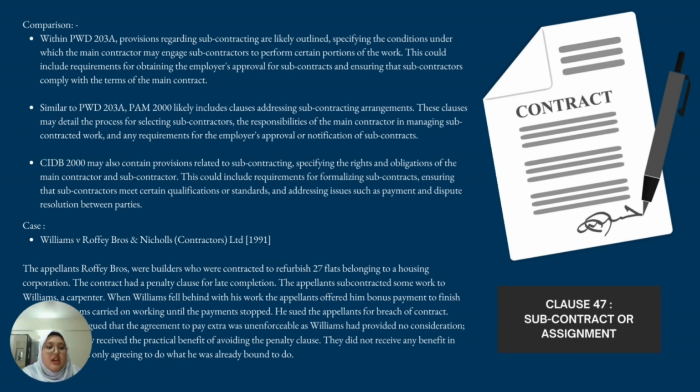So for the case, Williams versus Roffey Bros and Nicholls Contractors Ltd, 1991. The applicants, Roffey Bros, were builders who were contracted to refurbish 27 flats belonging to a housing corporation. The contract had a penalty clause for late completion. The applicants subcontracted some work to Williams, a carpenter. When Williams fell behind with his work, the applicants offered him bonus payments to finish on time. Williams carried on working until the payment stopped. He sued the applicants for breach of contract.